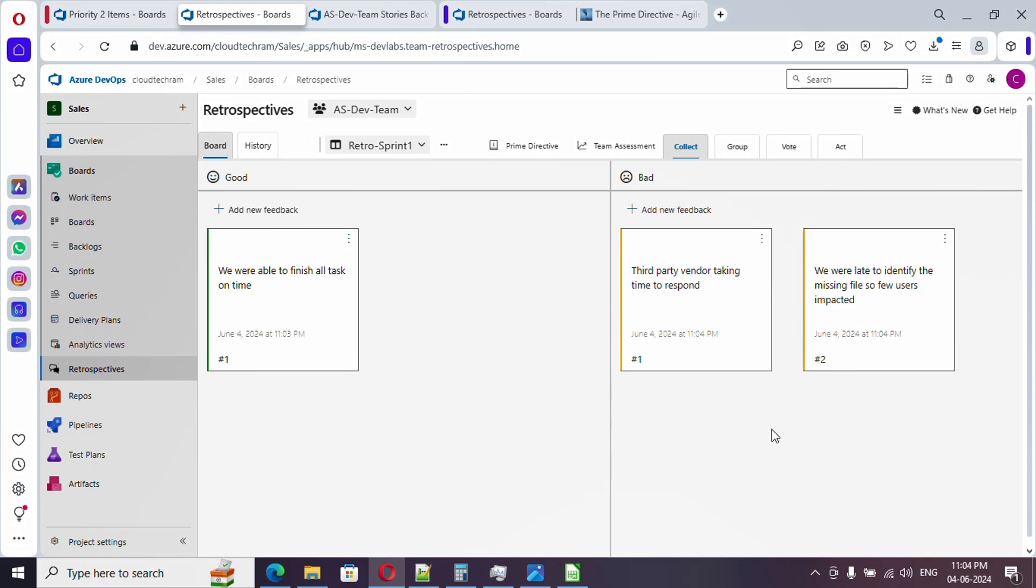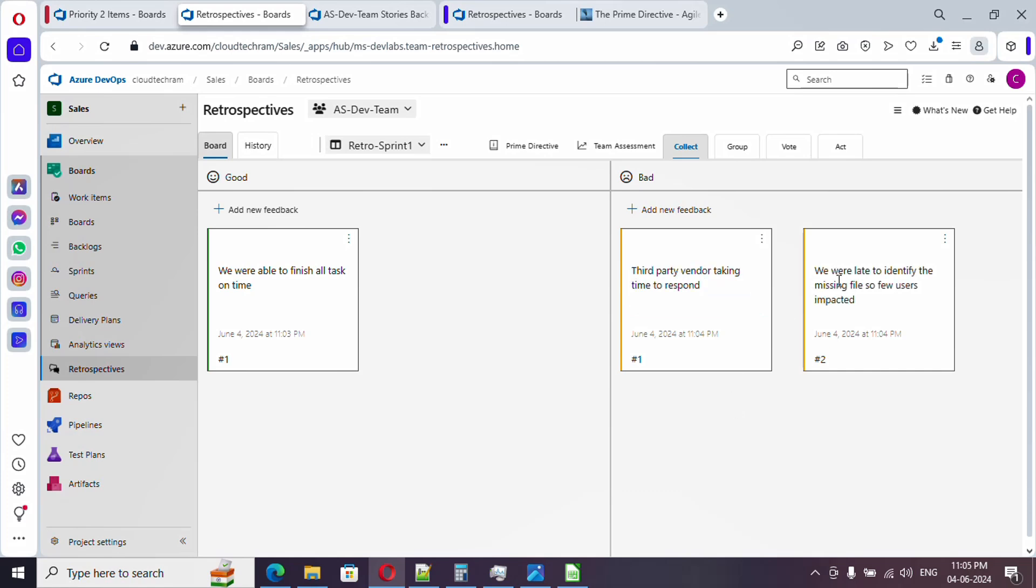Here if you see, two feedback are now added. In bad, third party vendor actually taking time to respond because of it some issues happened. This is one of the things we need to address. After that, we were late to identify the missing files on time, so few users were impacted. This is one of the issues which didn't go well in this particular sprint.